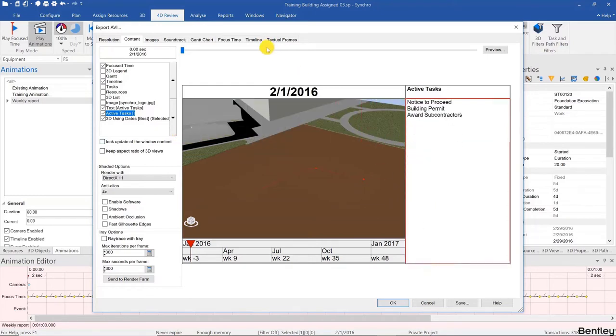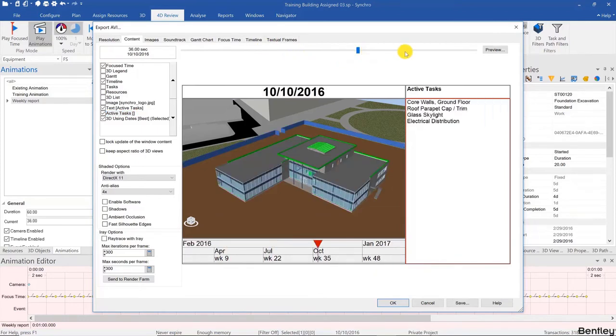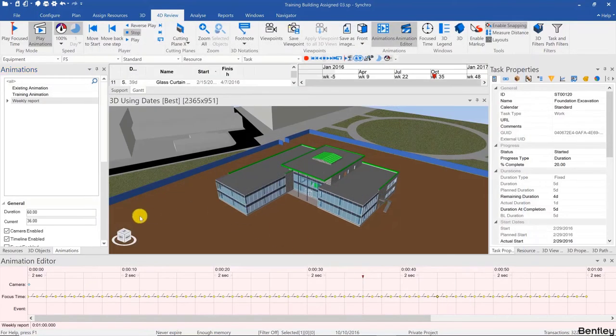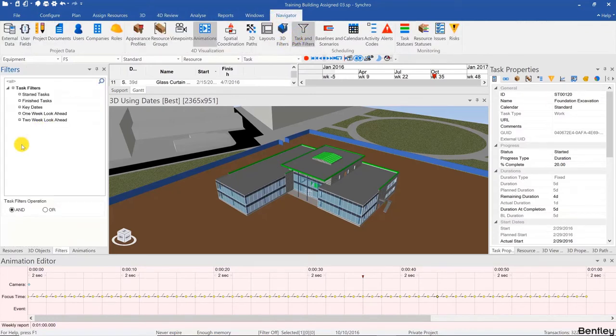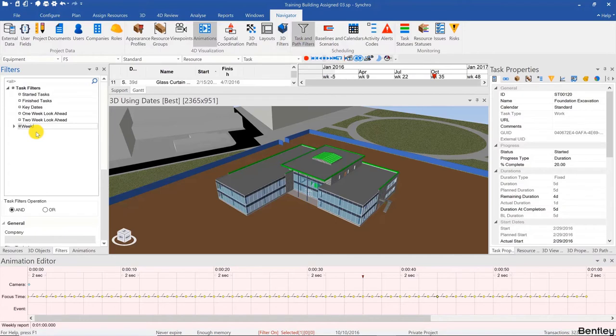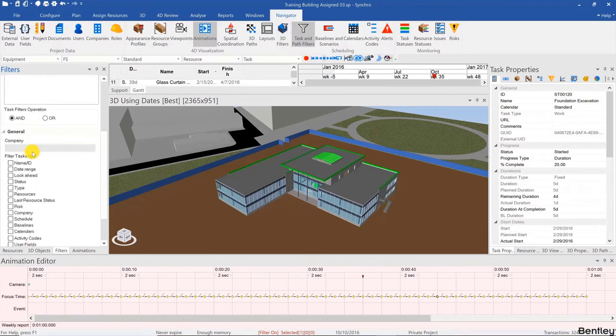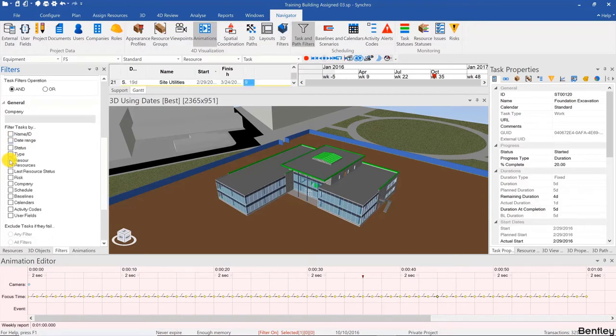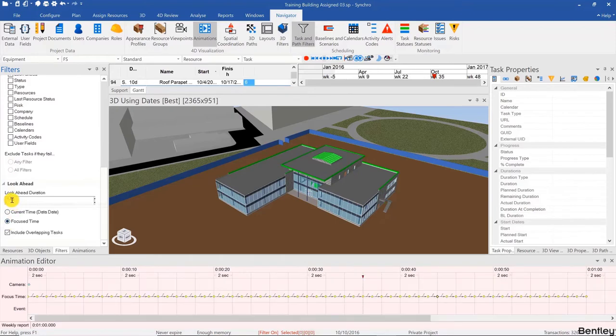Here we'd have a report that always shows the active tasks, however I don't really want to show active tasks since I'm doing a weekly report. I'll save this and then go back and create a task filter. We'll go to Navigator and then Task Filters. I'm going to create a Weekly Tasks filter, and that will be following a look-ahead based on the focus time for seven days.